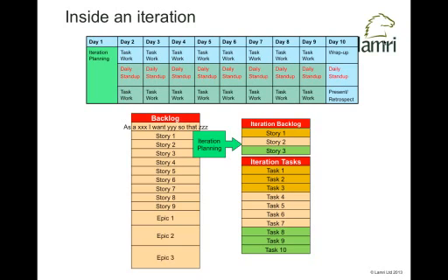You then get into a cycle where we do some work each day. We have a daily stand-up each day, and when you do that is up to you. Some people like to do that first thing in the morning, others like to do it at the end of the day. I've come across both. It's basically saying, what did I commit to do? What have I actually achieved? What are any blockers in my way, and what am I going to do next?